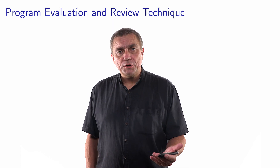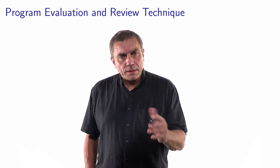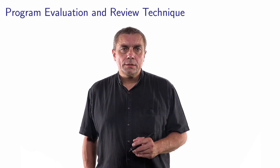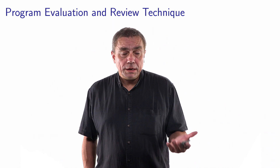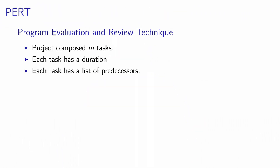We consider an application that can be formulated as a longest-path problem in a network with no cycle. This means that the shortest-path algorithm can be applied after the signs of all the costs have been changed. The application is called Program Evaluation and Review Technique, and the acronym is PERT.